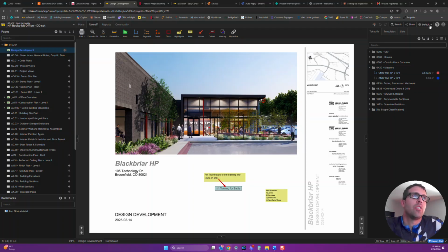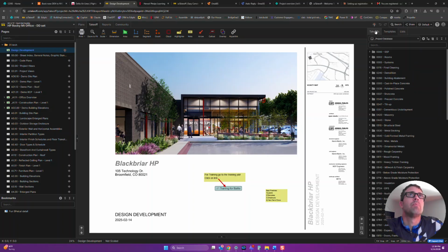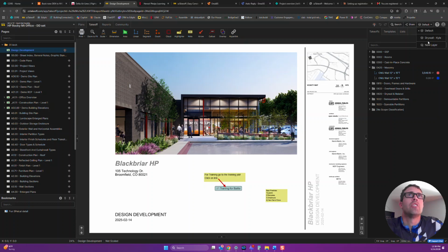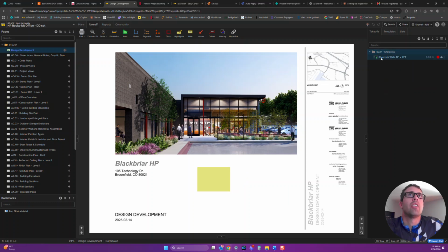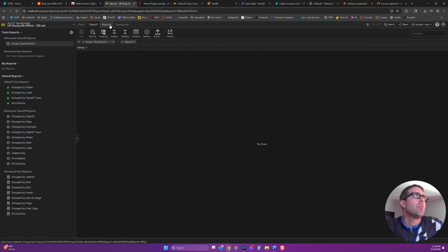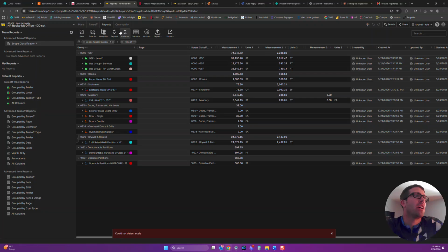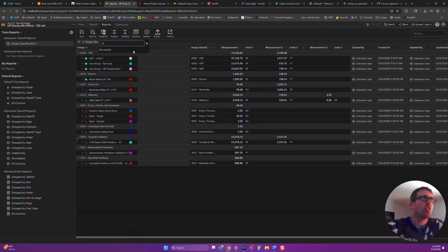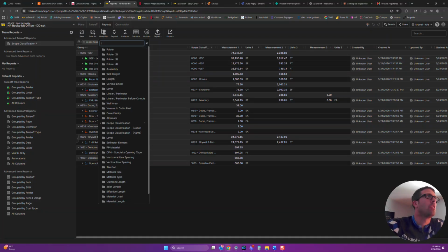So that's why it's critical to make a layer, and you can go to the layer, hop around other layers to see where things are. And then when you make new layers, make sure I did something on my layer. So I have one thing on my layer. I didn't do any shotcrete yet. Let me make some shotcrete. So now you can go to reports and quickly separate it out per layer, and you can quickly group by layer. Good type.